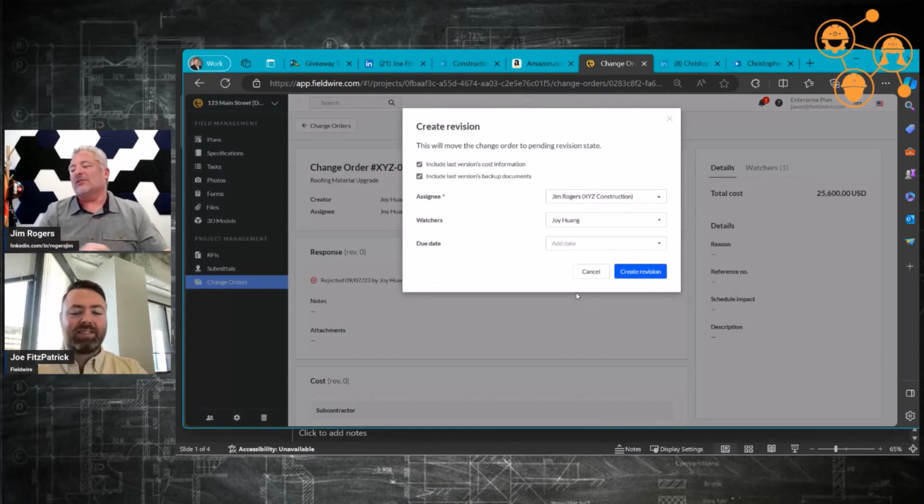Yeah, like you said, this has been submitted. It got rejected. Maybe it got rejected because there was too much markup on it, or somebody got a little overanxious and thought it was double the work it really is, so they just rejected it. And rather than having to start a brand new change order again, I can just create a revision to this change order and nest that in my log. Exactly.